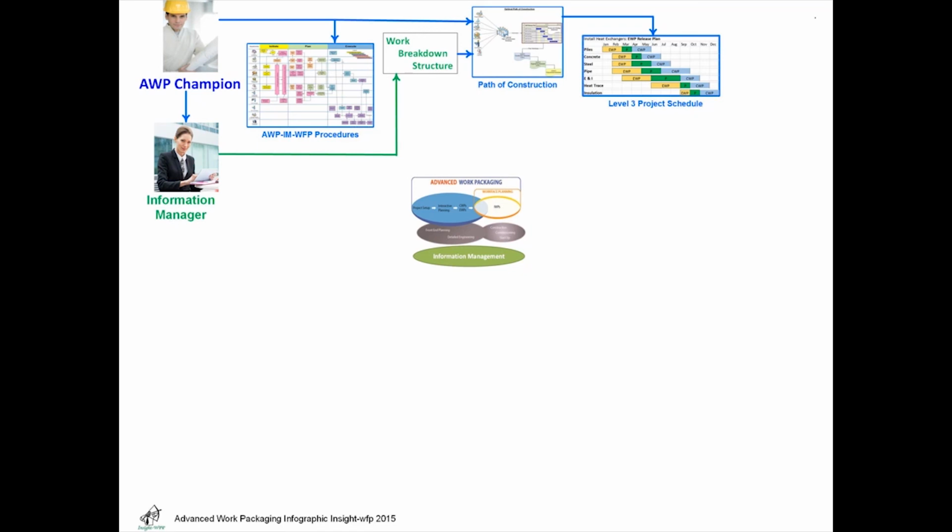The schedule identifies the sequence, contents and timing of the engineering and procurement work packages, which are required to support the optimal path of construction. The engineering team is then responsible to create and deliver whole engineering work packages that satisfy the schedule and ultimately the requirements of construction work packages. These engineering milestones monitor engineering deliverables from the ground up.